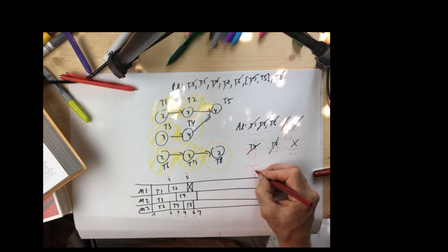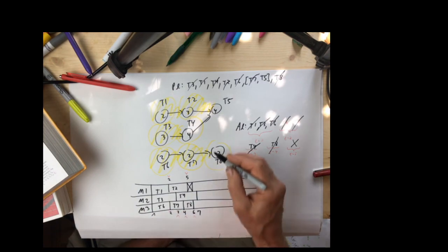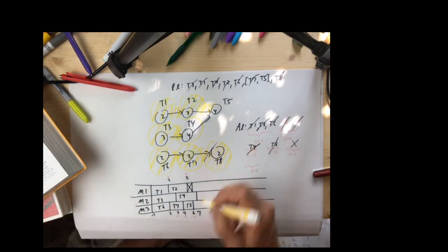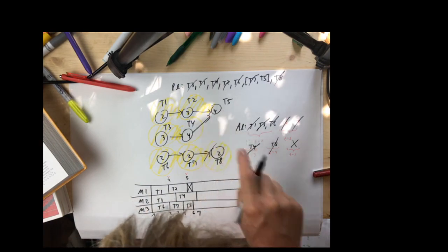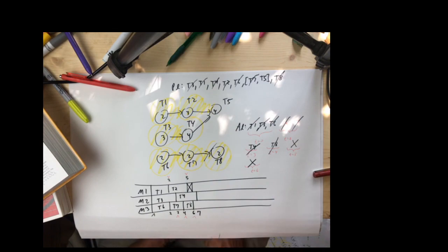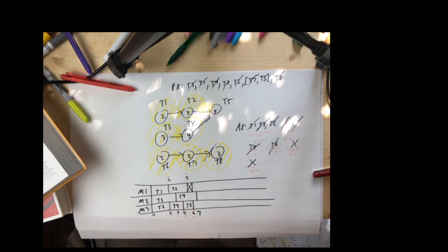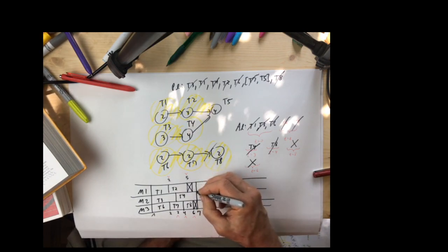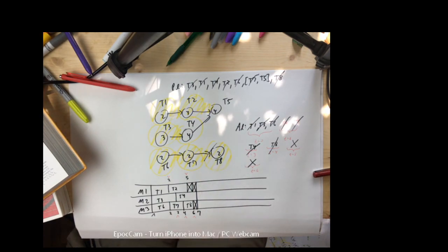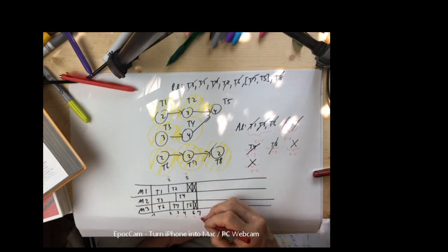So now we just came up to time equals 6. Now at time equals 6, T8 just got finished by machine 3. Uh-oh. T8 just finished. There's no new things became available. Again, nothing to add to the available list. And now at time equals 6, we have two machines waiting for a job, and I can't give them anything. So they get idled to the next stoppage time. Nothing to update, nothing to do anymore. Move the time marker forward to 7.